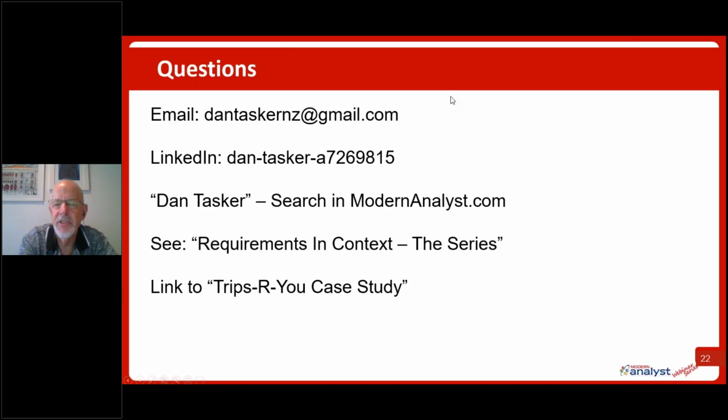You provide those textual statements. And I like to throw in that diagram because I say, look, as far as we know at this point, this is what needs to be in scope. These are the activities that are going to be supported. These are the actors. Notice we added one as we went. There can be more. And these are the descriptions of what those activities are from a system perspective. So high-level requirements are signing off those 10, in this case, 10 statements.